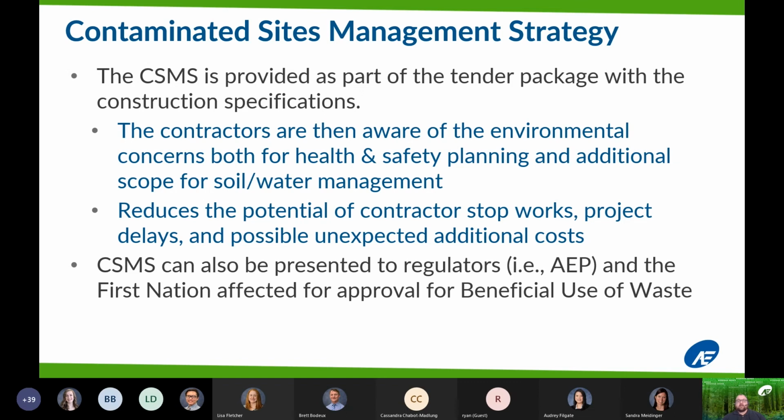On a regular type site, instead of the contaminated sites management strategy, delineation would likely be conducted and then either remediation or risk management options reviewed and then executed through a remediation action plan or risk management plan.